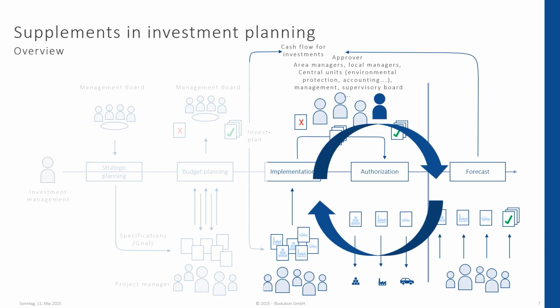Here, we can see the process of the supplementary in the workflow, from realization to approval and being included into the forecast, back to being realized, approved, and so on. Normal investments can also be adjusted, but the decision threshold for the supplements is what we use to determine if the project leader is required to create a supplement or just simply increase their given budget for the year. When this threshold occurs is completely customizable.